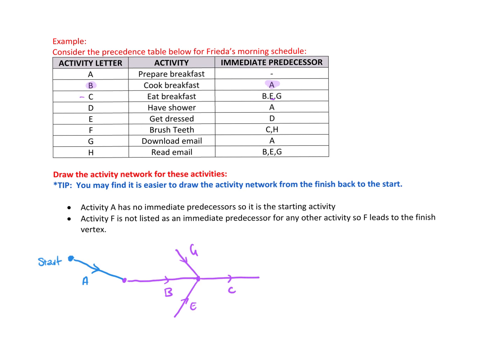The next activity is D — its immediate predecessor is A. So D comes out of A. Now looking at E: D happens before E, so I can draw a vertex and connect D up to E. Everyone's graph may look slightly different in layout, but as long as the connections are correct, it's all the same.